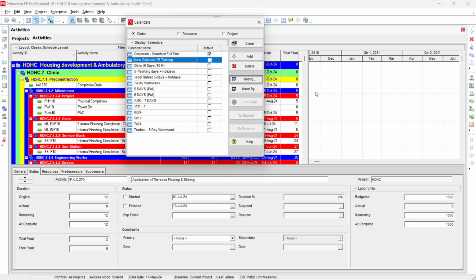Similarly, we have to define one calendar for the authorities. The government authorities also have 5 working days and 8 hours a day. And one calendar we have to make is calendar days, without considering any holidays or any working hours. This calendar, without any holidays and working hours, is used to compute the overall duration for the project. Because once we get a project with a duration of 2 years, this 2 years duration includes all working and non-working hours, gazetted and normal holidays, and weekly holidays.